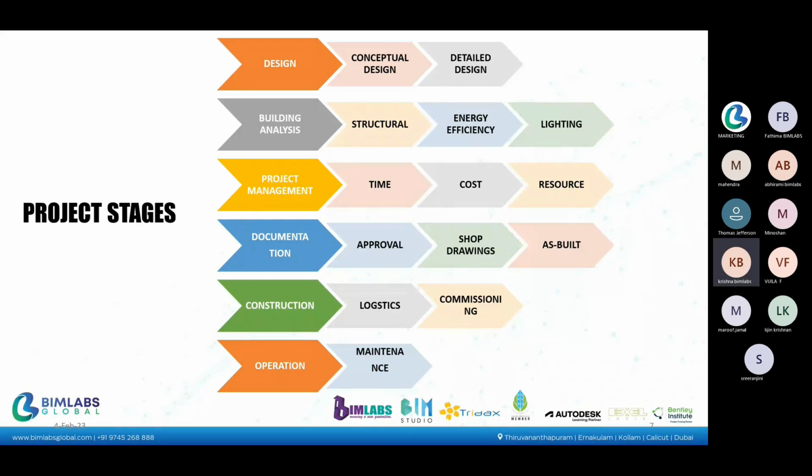For example, the manager in this project management, say for a residential building. Maybe it's a 6 or 7 month project, but the client is saying he has to complete it within 3 months. So we have to manage accordingly. We have to spend more time, or we have to incorporate more resources or more labor, and then finish as per the requirements of the people. That part comes under project management.